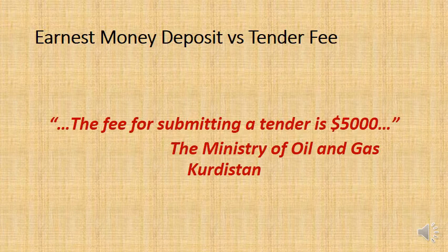So I have a 4 in 5 chance, an 80% chance of losing $5,000, but I have a 20% chance of making $40,000 or $50,000 more than my usual profit margin. So he's basically buying a lottery ticket. Cardo, Avan, Taba, Yar, Lausanne, they are all going to think the same thing. They are all going to submit tenders, probably around 140, 150,000.